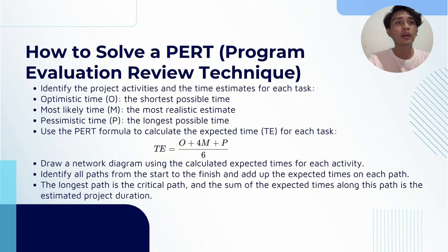And here comes the last part, which is the pessimistic time. That would be your final addition from the optimistic and the most likely time, which is multiplied by 4, and add, last but not least, the pessimistic time. And after that, let's divide it by 6 to get the average time given to your answers.